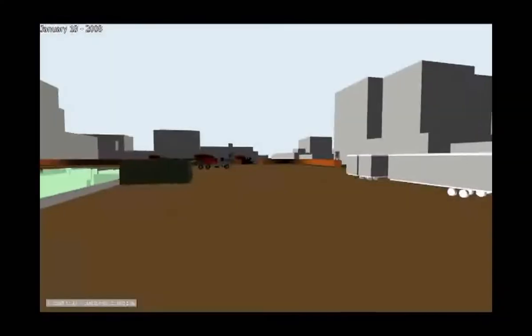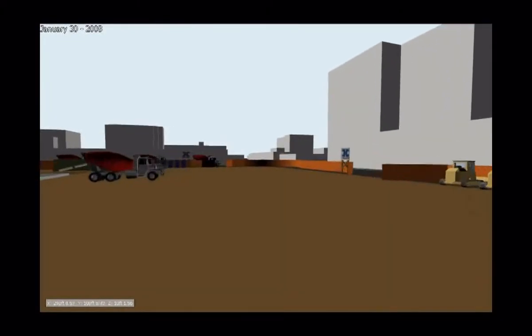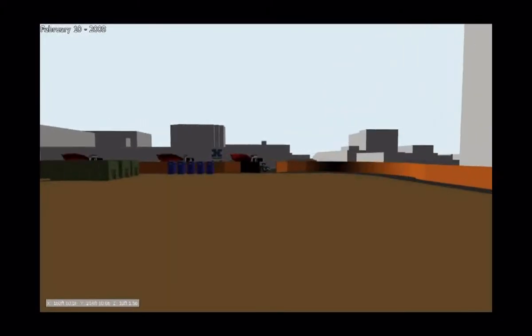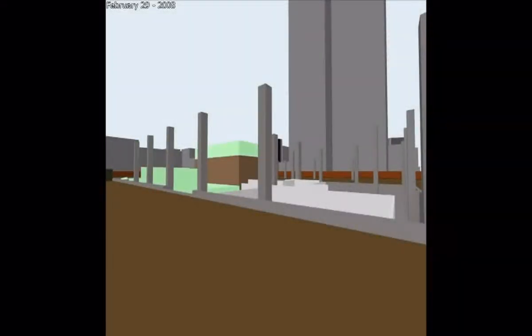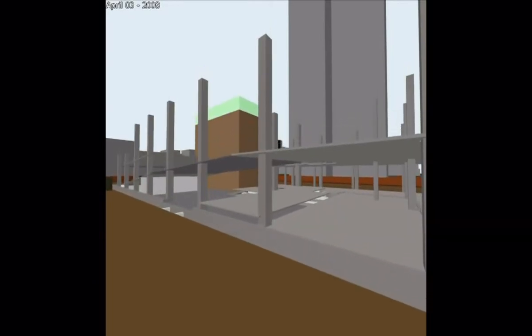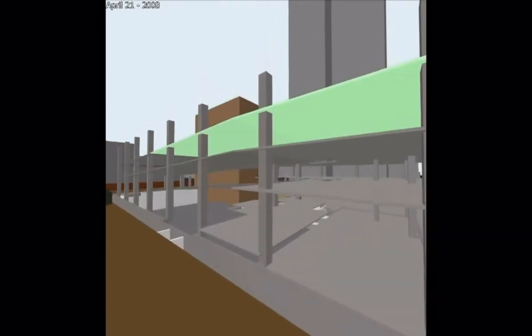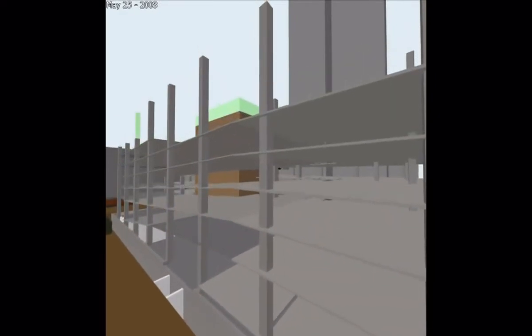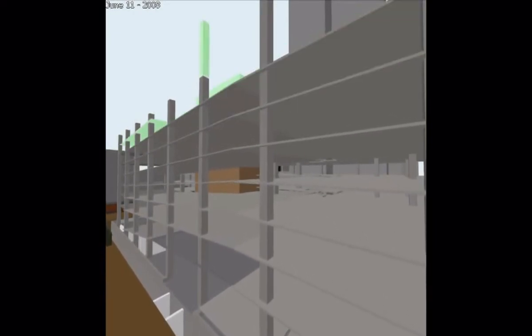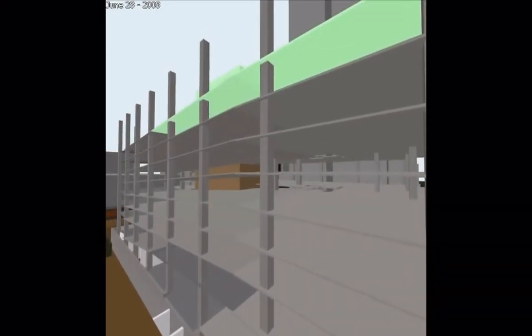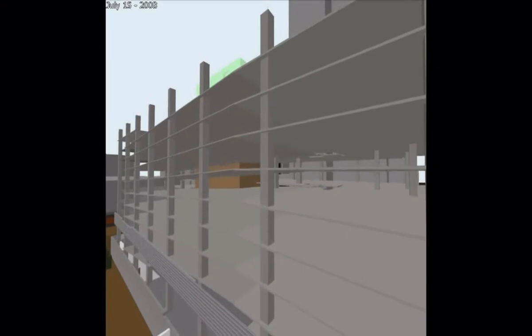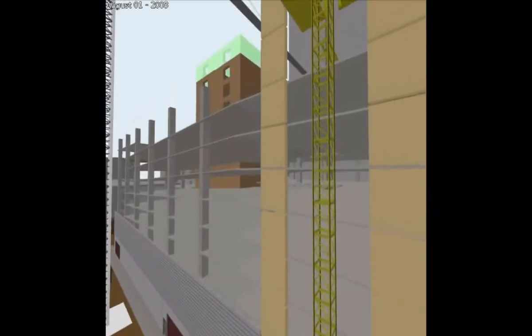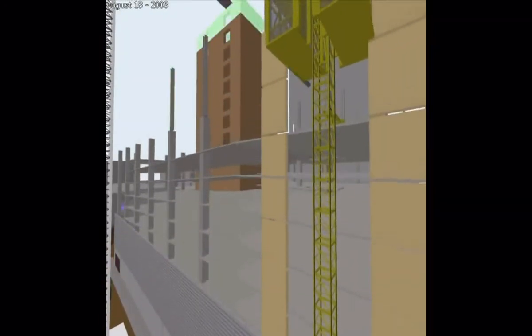And they have a whole process where they can get that idea of how they're going to build this project down on paper. What you can do is work with them to take those pieces of paper, take those ideas they have in their head, combine that with the geometry using building information modeling, using Navisworks, tie that information to the project schedule and help them visualize exactly what they're going to be building. And they can simulate how that construction process is going to flow and take a look at all the different ideas and options they can use, tweak it as necessary, and keep looking at different simulations. So really they're building the project multiple times, but doing it digitally on the computer.